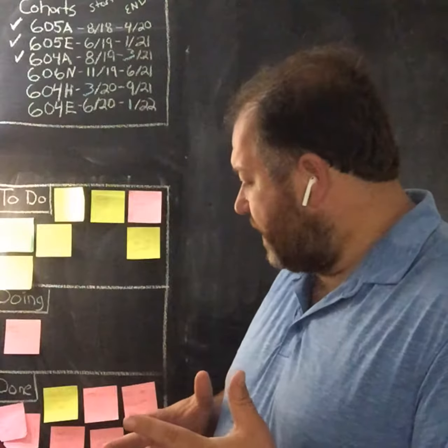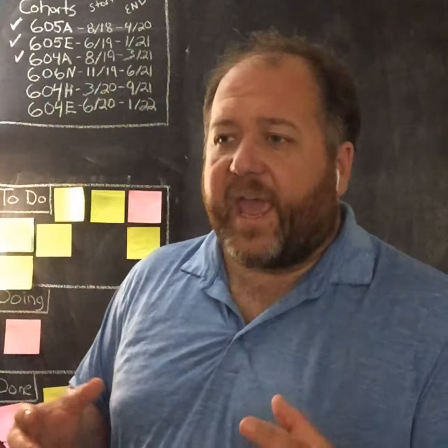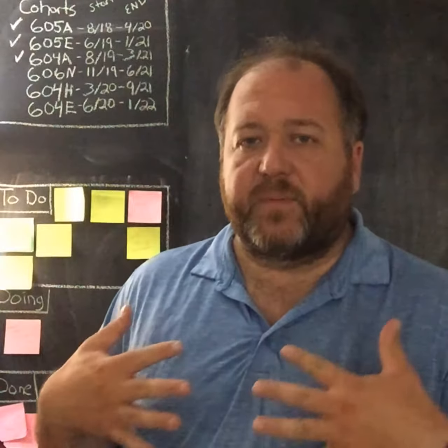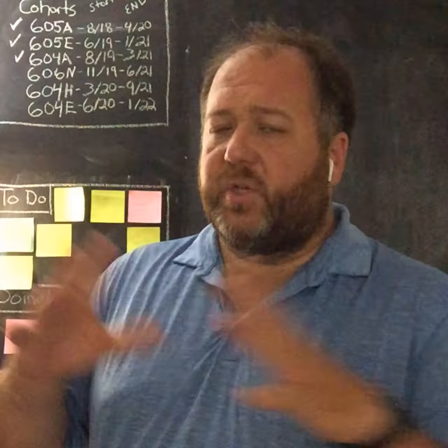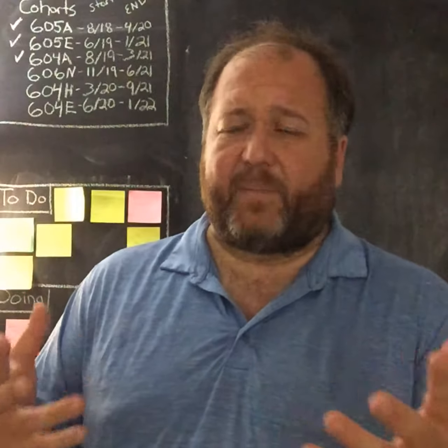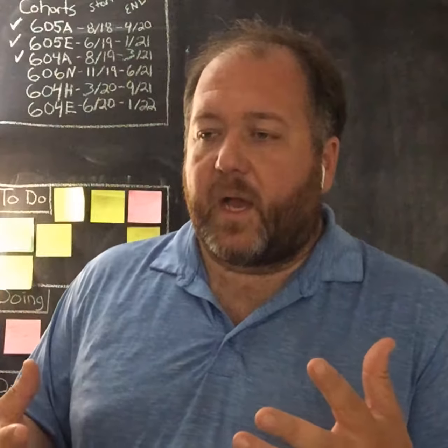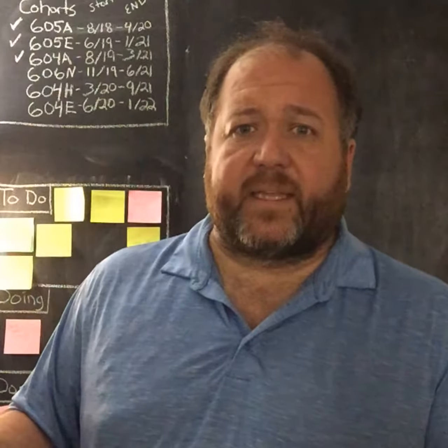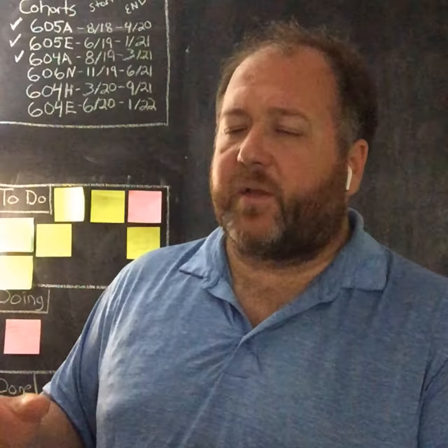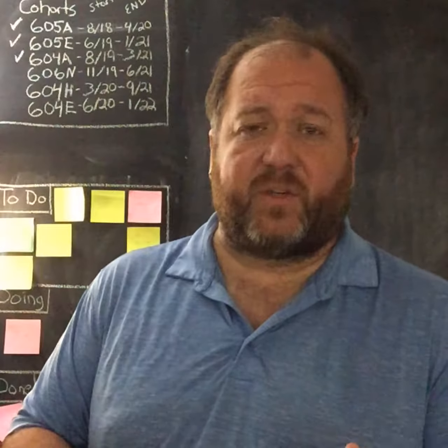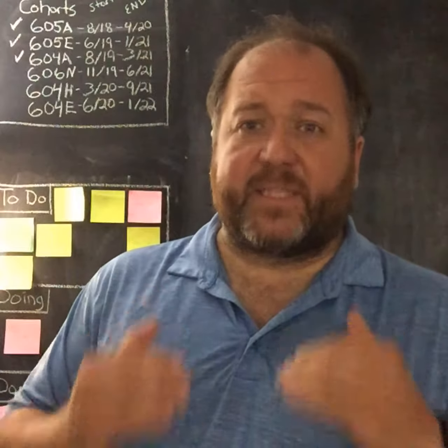Next are the exclusions from the scope. And personally, this is the most important part of the document for me. So to use an example, if you are going to be running a project to install a new LMS server, there's a lot that goes into that. And there's a lot that doesn't go into that. You may be installing a new LMS server, but you might not be loading the courses onto the LMS server once it's built.